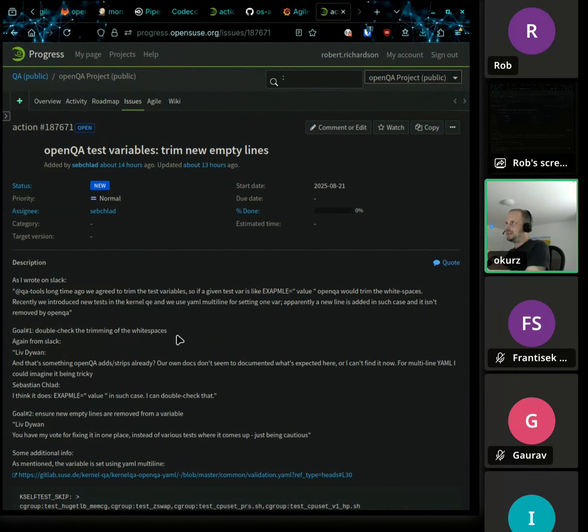You mentioned, as it says on the wiki, that basically anybody can do the triaging and make the decision: should it be on the backlog or should it not be. The backlog has strong limits; it's actually much lower than 100 nowadays, it's 64. We want to have a focused view and a focused plan for the team, so that's why there is this limit. That means there's a good chance that the ticket might or might not end up on the backlog.